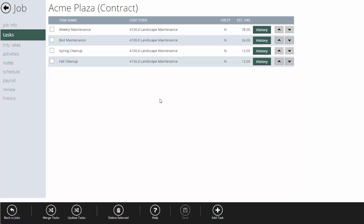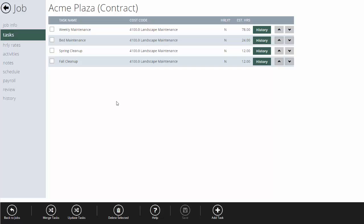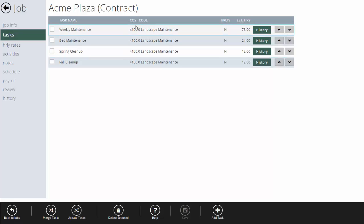For this example, I created four tasks: weekly maintenance for the weekly mowing, bed maintenance for the monthly maintaining of the garden beds, and then a spring and fall cleanup to track time spent there. Each one has its own estimated hours, so at the end of the year I'll be able to review the job and see exactly what came in on budget and what came in over budget. You don't want to get carried away with tasks — if you set up too many, it'll be too complicated for your crews. They'll clock into the wrong ones or be confused, giving you inaccurate data. Keep it as simple as you can, giving yourself just enough information to improve.